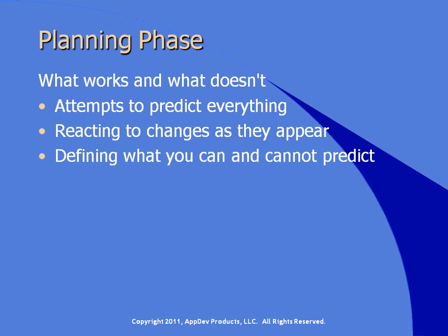And by defining what you can predict and expecting some change, you can balance the need for order with the reality of the human world. This adaptive approach is widely acknowledged as the best approach to software development. SharePoint is well suited to an adaptive approach because it is possible to deliver features into the hands of users quickly for evaluation, get feedback, and make changes before distributing to a wider audience. That said, some aspects of SharePoint are very difficult to change after you deploy them. Those are the things you try to identify as part of the project plan.